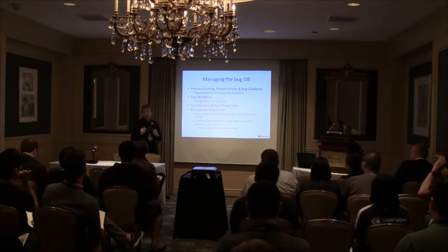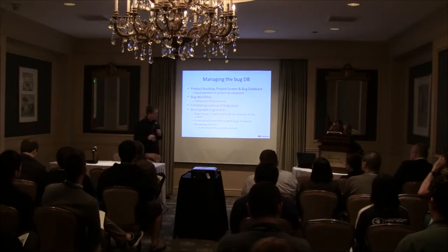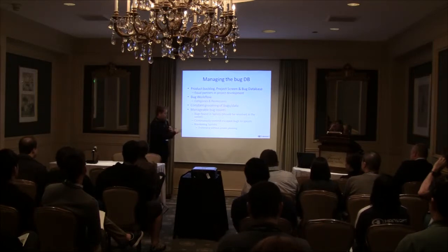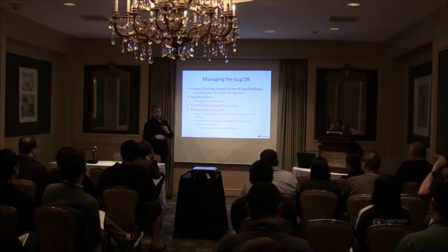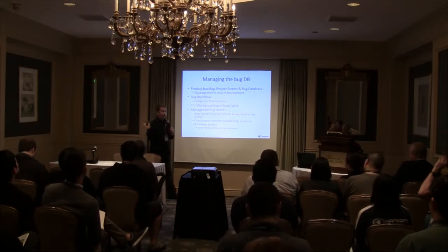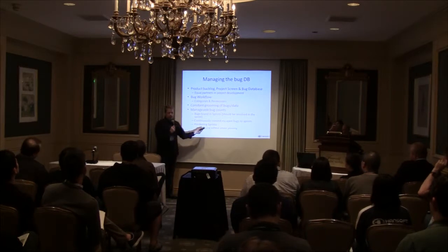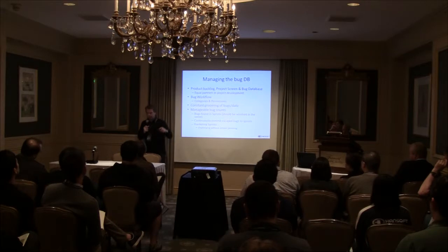Now, there might be very valid reasons why you could do this, but almost all the time I've seen this happen, on my teams, and even on teams that I visit throughout my role with Handsoft, and I've visited hundreds of individual teams, every time I see this, it turns into another feature development sprint. So you're trying to cram everything you didn't get completed into that last sprint. That's usually not a great situation.